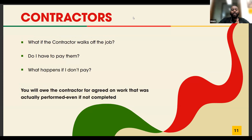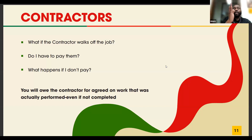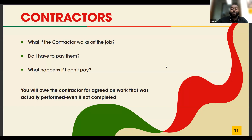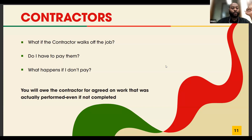Regarding contracts in phases: I'd recommend drafting one complete contract rather than multiple phased contracts. What gets broken into phases is the draw schedule between you, the lender, and the contractor. That schedule — detailing what amounts get disbursed to the contractor and when — should be written within the overall single contract.